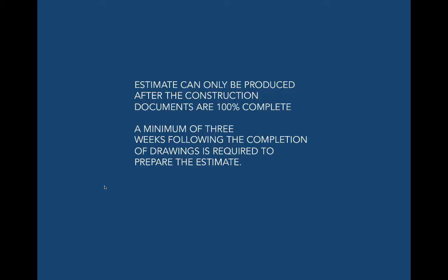We just had a project that we put out recently. We asked that the cost consultant do a trade takeoff. They generally don't do trade takeoffs, they do elemental, they do components. The way they measure the building is in components and pieces, and they cost it. But at the final estimate, we asked the cost consultant to do a trade takeoff the same way a builder would do a takeoff. So a builder will measure the materials, the trades will measure the materials, and they'll put hours to it. Those are the two components that will create the basis of the cost.